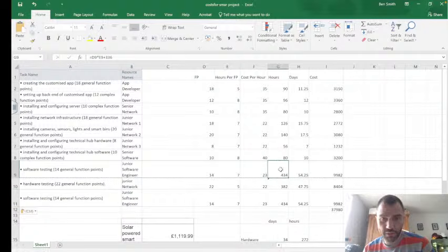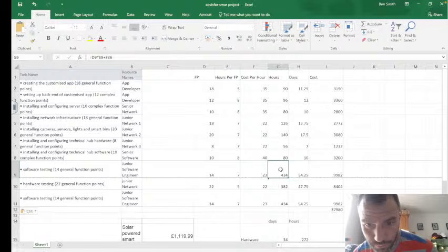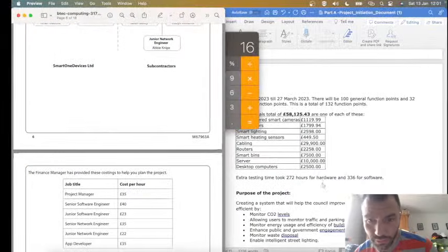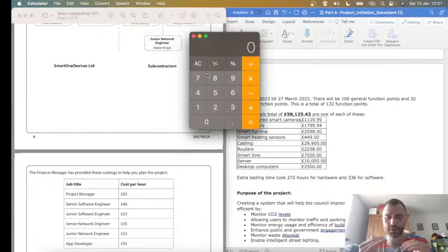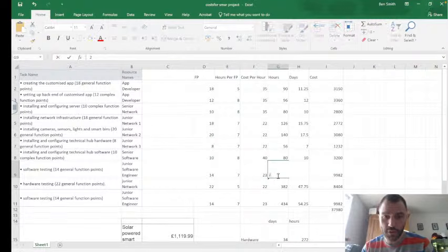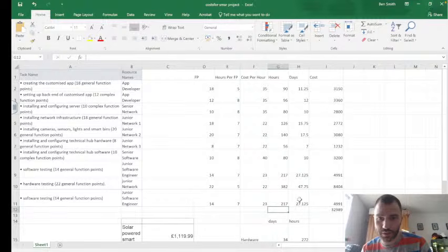We're going to give half the hours to the junior. So you have to create 2 separate tasks now, because you've got an app developer and a software developer, and they're on different tasks. So 434 divided by 2 equals 217. So I'm going to put 217 hours on that task, and 217 hours on that task.